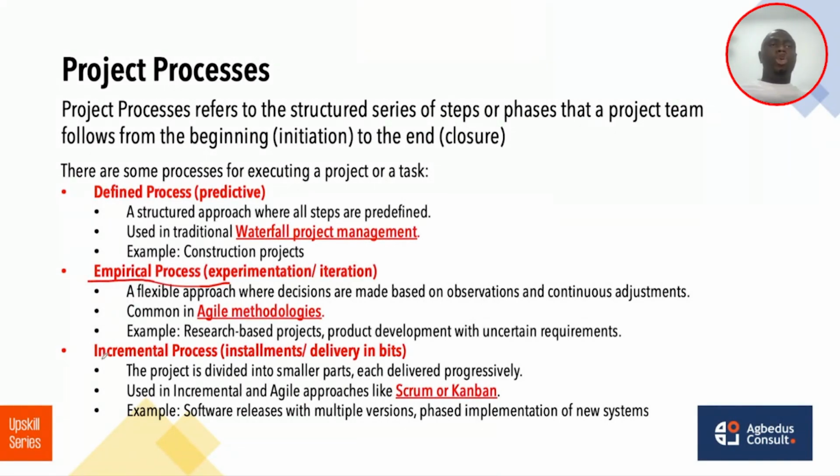And the incremental process has to do with building in installments, or delivering in bits. So let's say you build a university and you need a website for your university. The main thing that people about to attend your university will need is a homepage and an admission form.